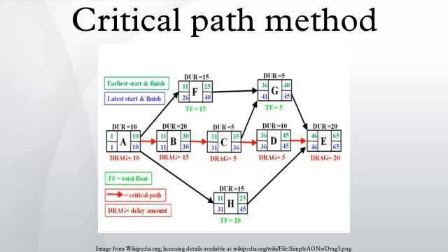Flexibility. A schedule generated using critical path techniques often is not realized precisely, as estimations are used to calculate times. If one mistake is made, the results of the analysis may change. This could cause an upset in the implementation of a project if the estimates are blindly believed, and if changes are not addressed promptly. However, the structure of critical path analysis is such that the variance from the original schedule caused by any change can be measured, and its impact either ameliorated or adjusted for.